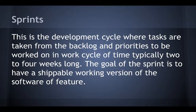The goal of the sprint is to have a shippable working version of the software or feature, also known as a minimum viable product. In theory, if you're disciplined in integrating test-driven development, continuous integration, and continuous deployment with integrated QA testing, you can have a shippable product at the end of a sprint. But if you do not have all these components, there is no way you will have a minimum viable product worth shipping. I can tell you a lot of horror stories about missed release dates, so just make sure you get your pipeline down and quality should be the metric you track and improve on. All this sounds easy to do, but it's quite an accomplishment when you pull it off.